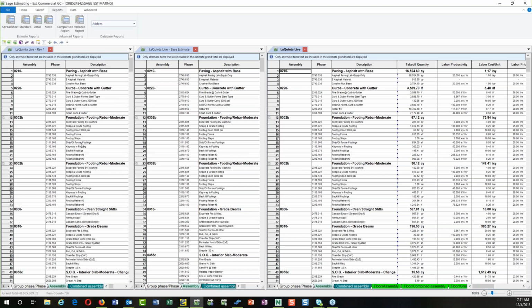I could just pick an area like that slab and do it between that area that we had here, or I can actually do it at every level and at any detail. So you've got lots of options. That comes in handy, especially if you're doing negotiated or design build, because the owner wants to know what changed and where we're at and what the progress is here. That gives you a picture of each estimate that I'm doing. And this can be as many as you want. Now, if you've got a bigger screen, you can actually compare more on screen if you want to. So this is how I would do this in a 2D type estimate.